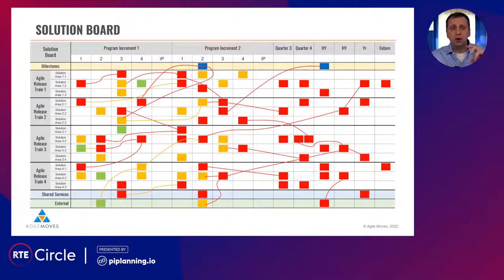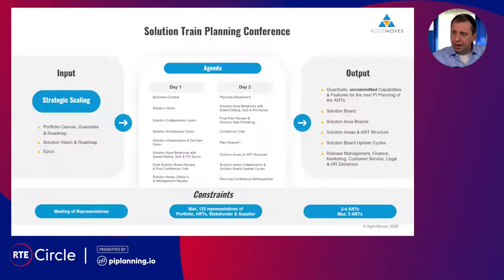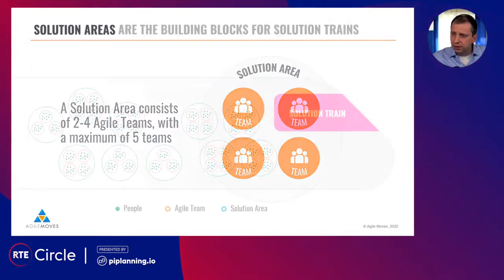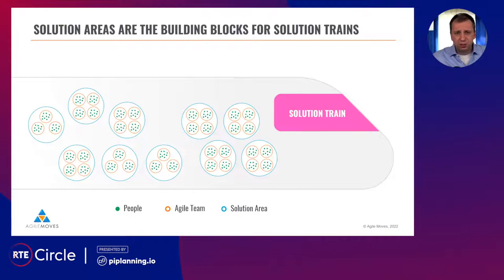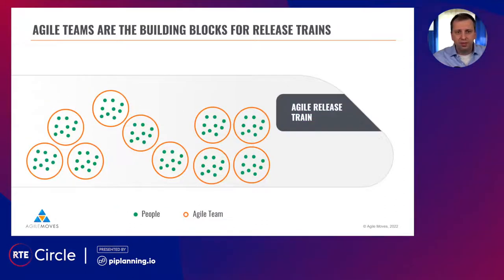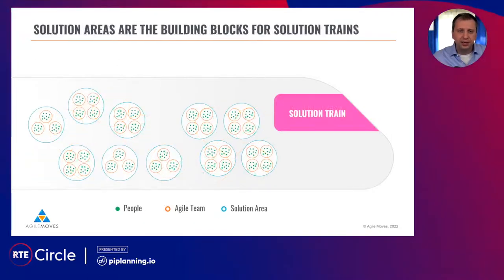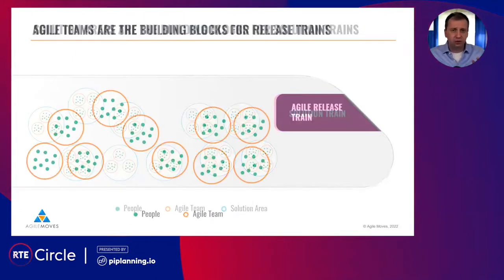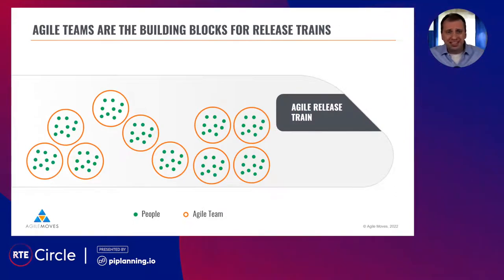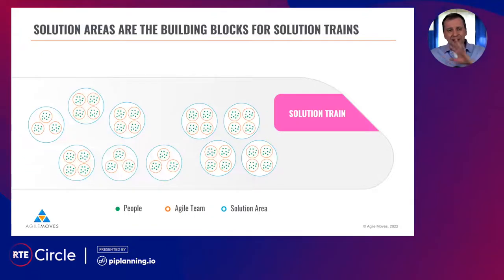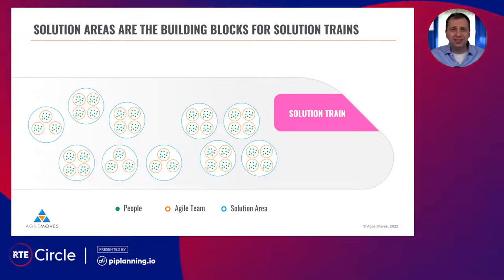So this is what we are doing: setting up solution trains with the help of solution areas and setting up planning conferences, creating agile solution boards. Now, if you look at a solution train with solution areas and a release train with agile teams, you see the self-similarity. We are scaling up the building blocks — just as an agile release train has maybe 10 agile teams as building blocks, a solution train has maybe 10 solution areas as building blocks. This is usually easier to manage.